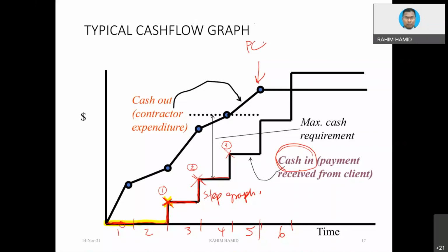Let's say the project is running for 5 months only. Well, because the payment from the client is going to be delayed, by 1 month, for instance. That's why we are going to get the third month, the fourth month here, the fourth claim, and then the last claim would be here. Nampak tak? So that's why in the calculation we are going to extend